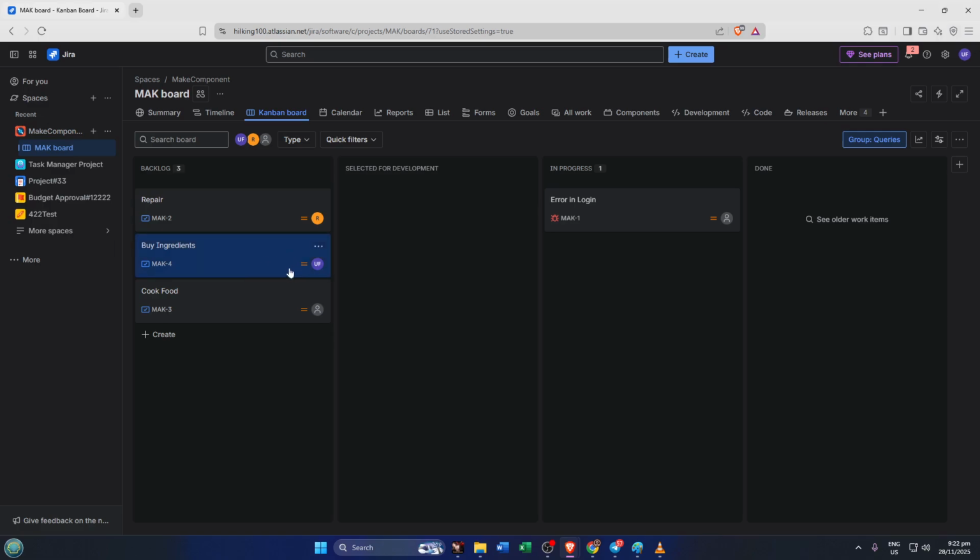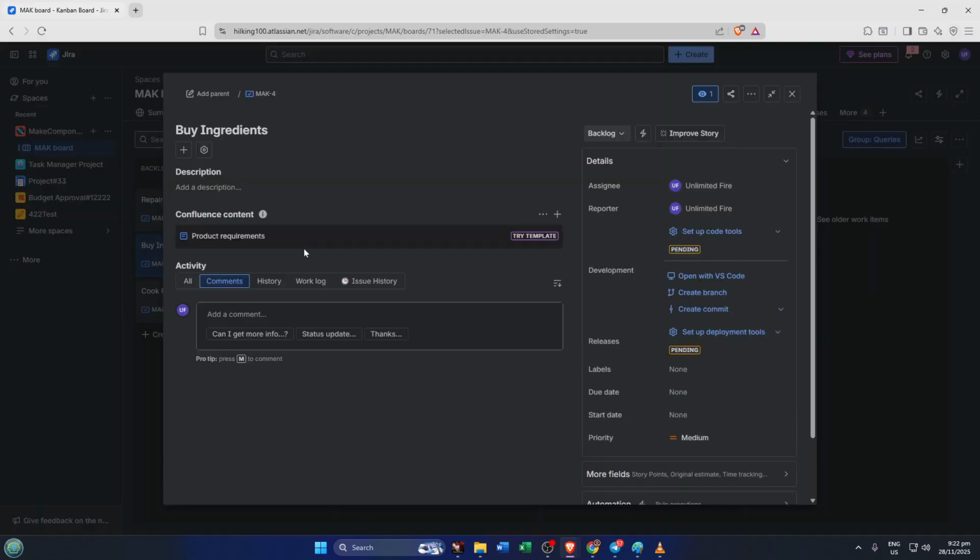Our first step is to correctly link our issues. This is critical because issues need to have the right associations to reflect their actual status in your project. Let's start by navigating to the issue that's being held up. This is the task that's caught in a roadblock and cannot progress. Look for a plus icon on your screen and click on it. It's labeled as Link Issue.